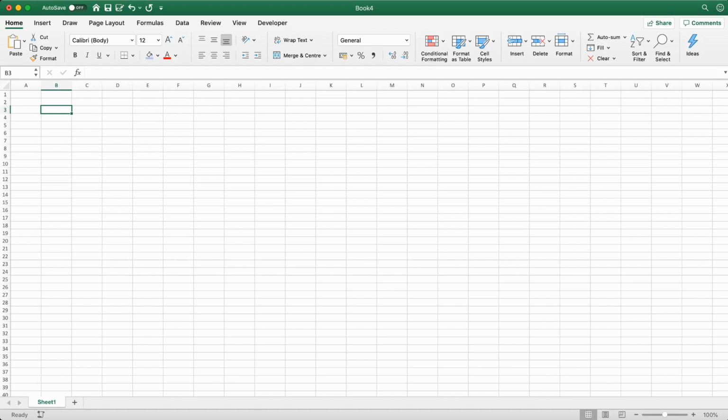We shall start this work breakdown structure in the numbering 1, of course, and for this one, we shall call it the engineering and project management. The engineering and project management is a broad scope of the project calculation and will include general costs such as the reference to project management, the site management, the detailed engineering, and eventually some commissioning and other general tasks. As said, we can detail this into more subsets.